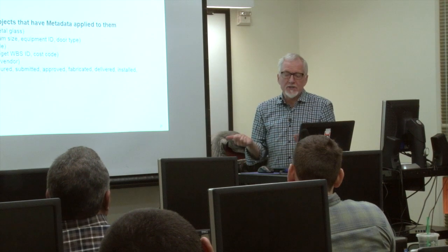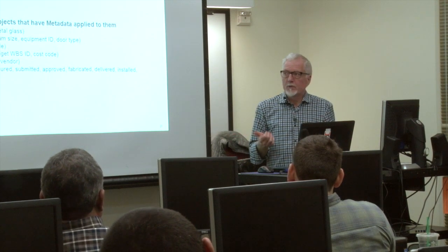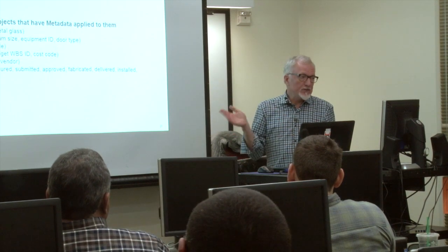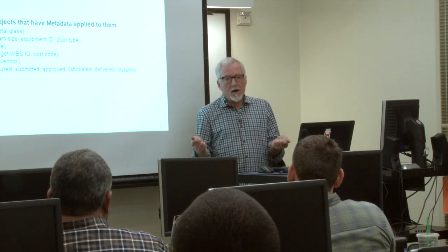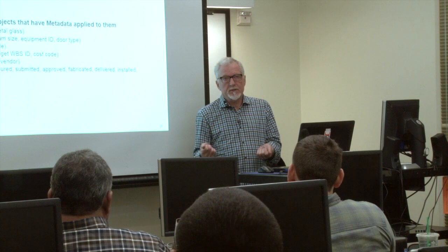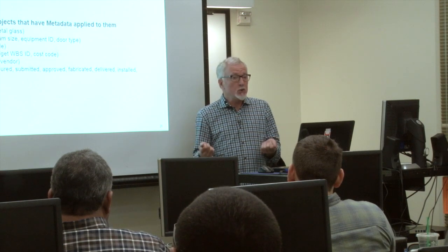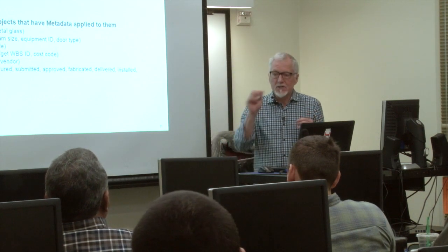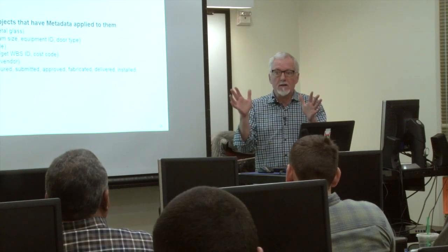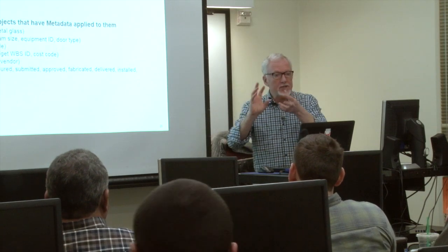If we link our schedule to this and our resource load to this, we can ask questions like, show me all the objects in the model that are scheduled to be installed in the next 2 weeks that don't have approved submittals. Really powerful management of this data. And it's not just a report that spits out, the model is now filtered and it shows us all the objects that meet that particular search criteria.